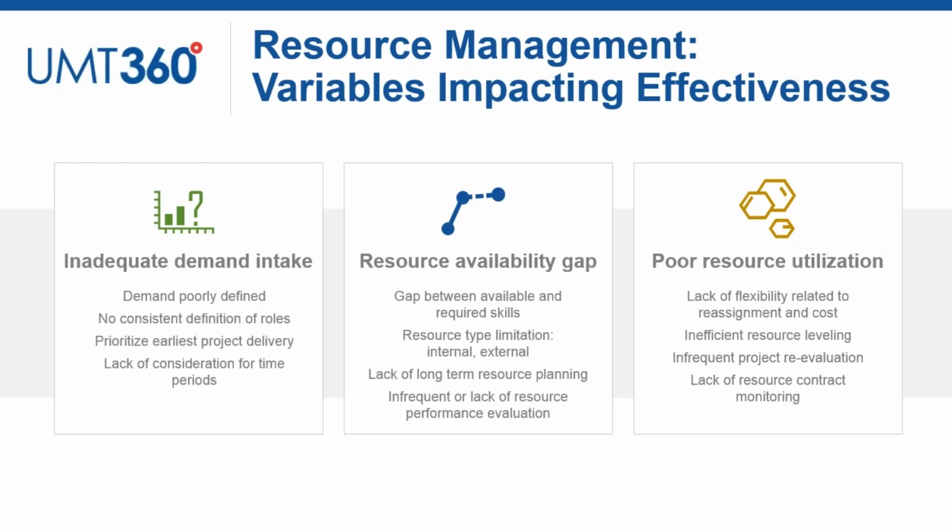It very much is based on having a good quality of demand, trying to not only understand what kind of resources I need for so-and-so project, but also plan ahead, let's say 3 or 6 or 9 months ahead. If I know I need more developers 6 months from now, I can start hiring people right now, either internal or external, for example. So those are really important parameters to be aware of.